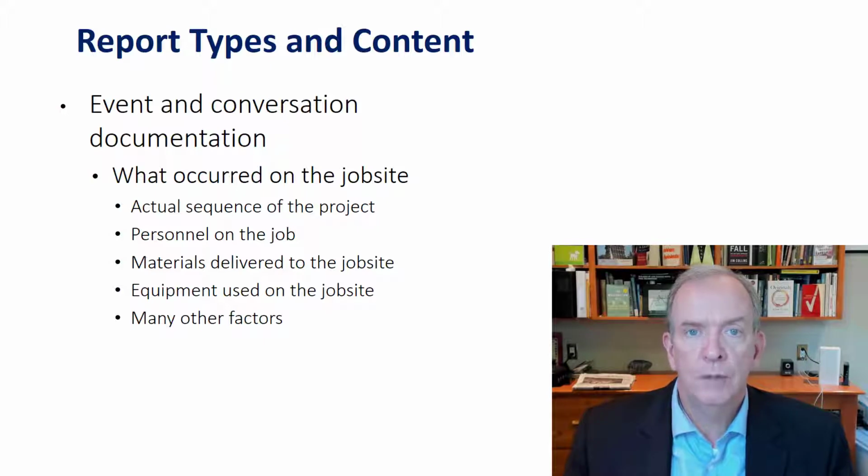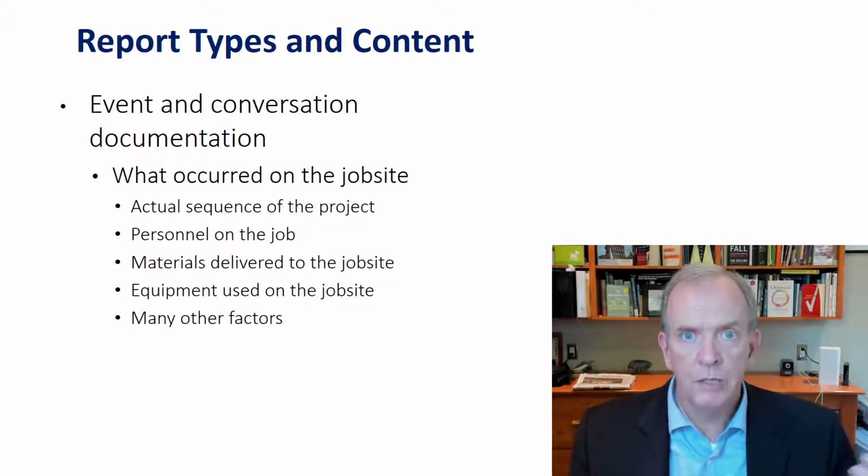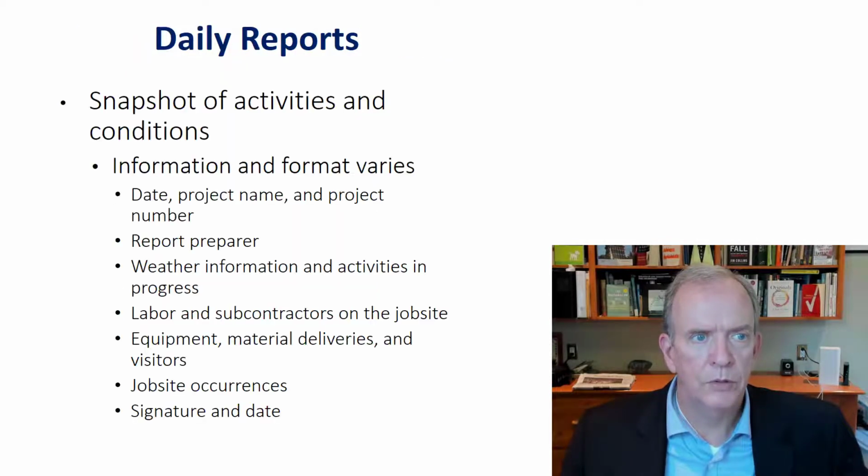So if we're looking at equipment and we were renting equipment, if we know when it arrived and when it left, and then when we get the invoice, if there's a discrepancy, we could always review that information. So they're charging us 2 weeks for this front end loader or Bobcat, and we only had it 1 week. So we go back to our records, we double check, we verify, and then we can have a discussion about the error in the invoice. So those are types of reasons why we would want to do that.